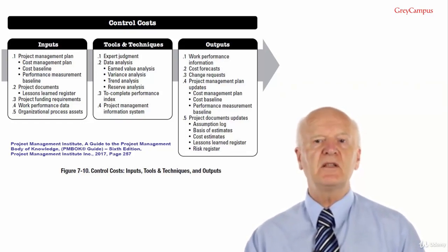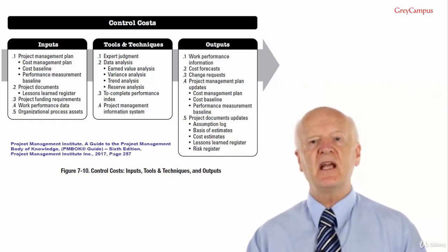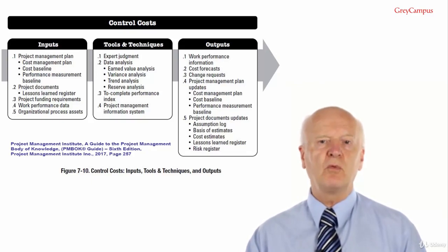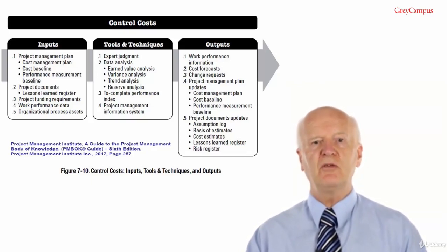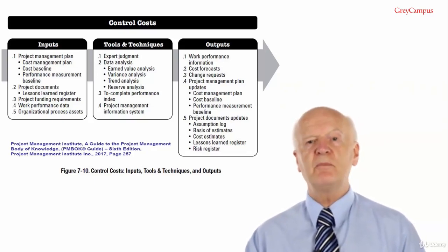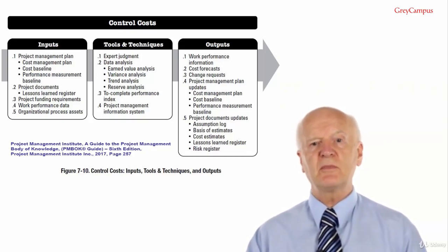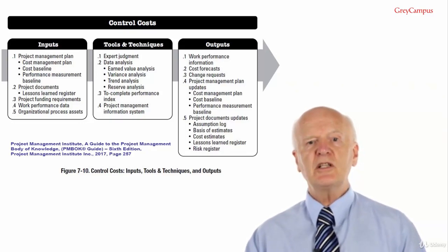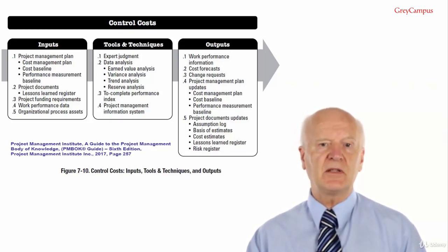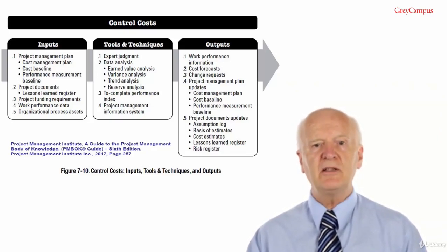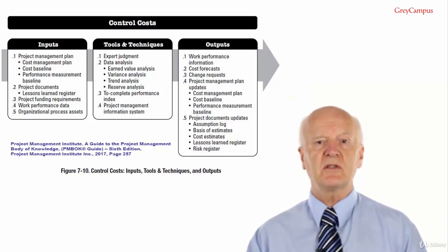The next key dimension of earned value management is earned value. Earned value, EV, is a measure of the work performed expressed in terms of the budget authorised for that work. Suppose you have budgeted $5,000 to build a 50-metre brick wall. You expect it to be completed at the end of the 5th day. So the planned value for the finished wall is $5,000.